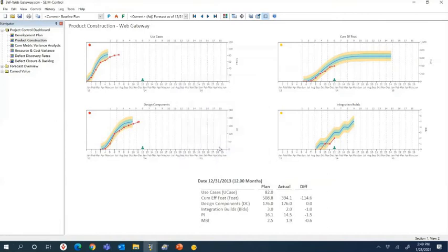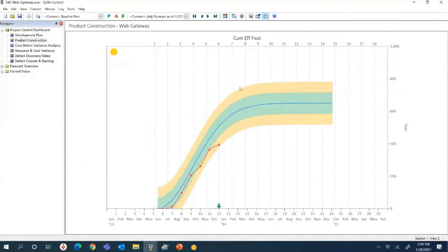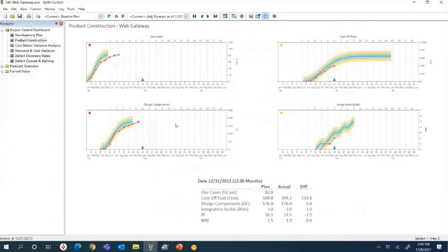and then we can leverage that setup to manage the project according to the plan. So here we are with the dashboard. Again, the navigator concept, same as the estimating tool, right? We've got all these views here to my left. And here we're looking at sizing information, the construction part of everything. And here are the features, again, right? Here's my plan in blue. Red data points are my actuals. Yellow lights coming on showing me I'm in trouble. So this is, by definition, a runaway project. It's going to be running late.